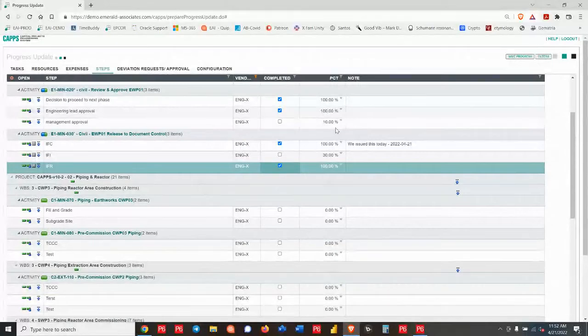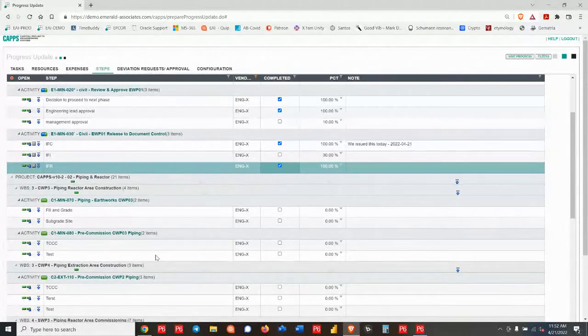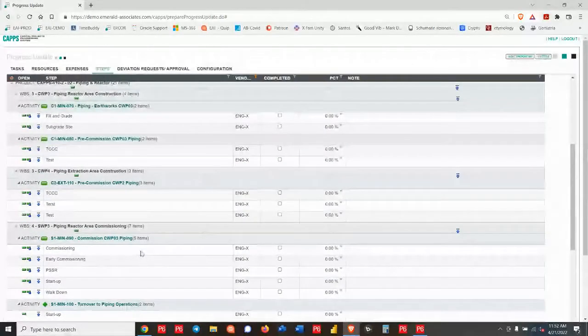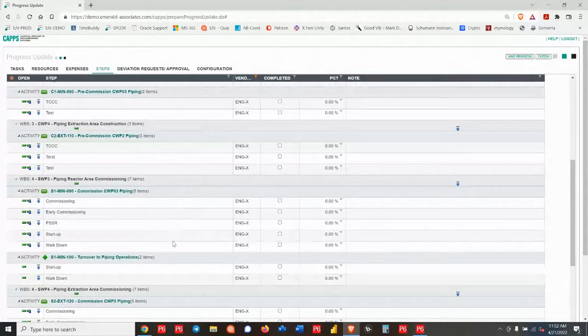Okay, so very important. This could be the way for you to take advantage of steps and actually be able to consume those with a non-P6 user, which is not easy to do if you're just using P6. So that could be a really great way to get a more consistent percent complete on some of the engineering work that you might have out with your team.